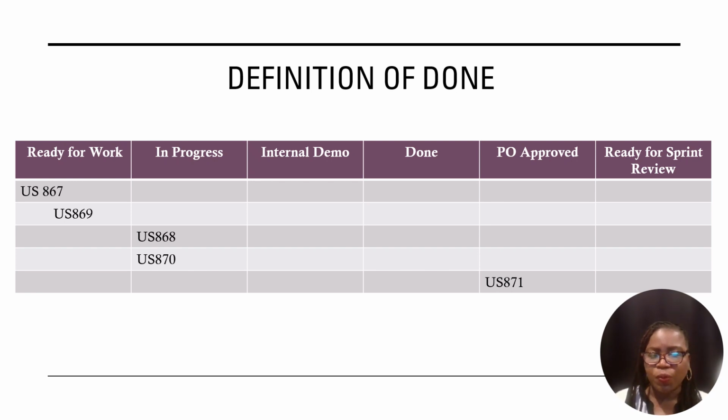So if we had a list of stories that we have worked, meaning that we have determined and gotten them ready for work, and we've determined what the scope is and identified that in the description. They've been prioritized and they had been sized, and there was a definition of ready and a definition of done included. Then they ended up in our ready for work pile, meaning these are the items that are ready for team members to start accessing, pulling, and working on.